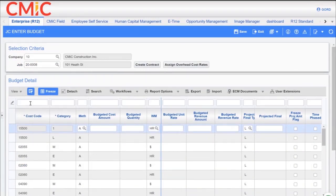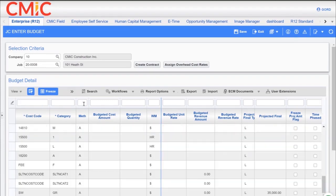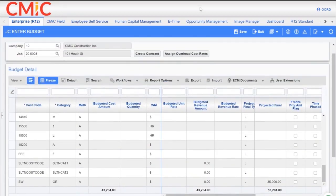We'll take a look at that cost code and see if it hit our job. There's our cost code that we just brought in. The category is B for Burden, and the budget amount was $7,500. If I remove the filter and go back to a non-filtered view and scroll down, you'll notice that my budget number has been uplifted by those lines I added.